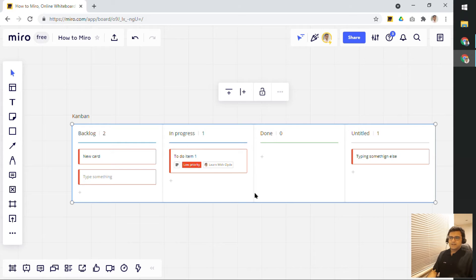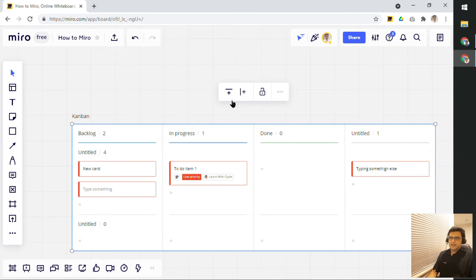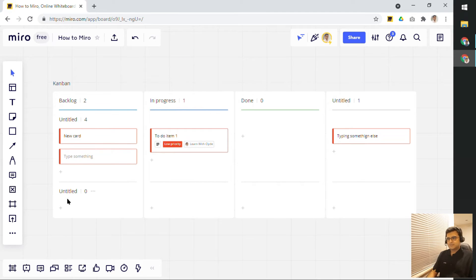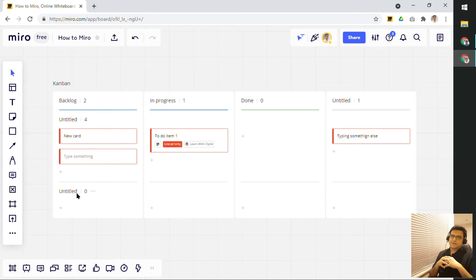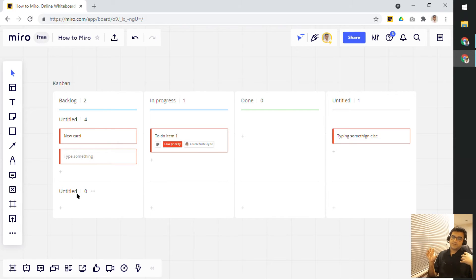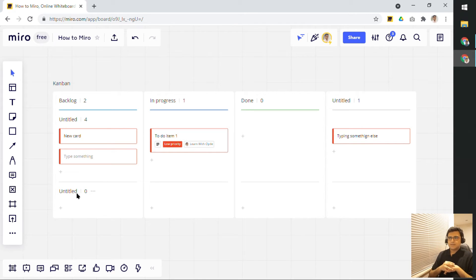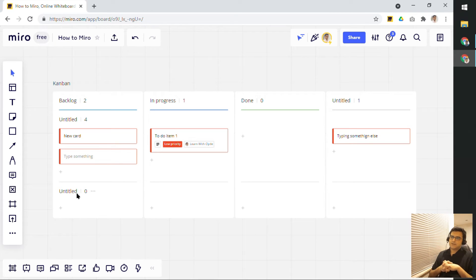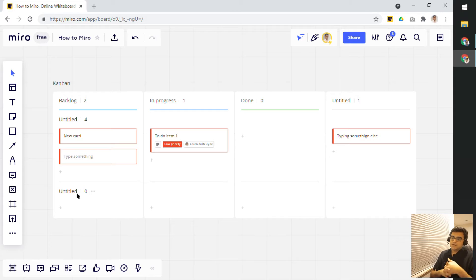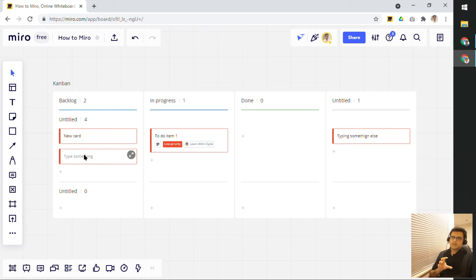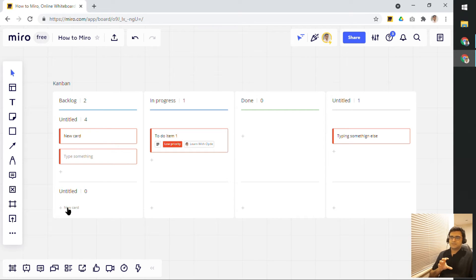Now, if I click on the board, I can click and add a new swim lane. Now, this is useful for example, if you were, let's say, planning something, but you have two different pipelines that you want to look at and two different streams that you want to look at. So, let's say one team is looking at feature one and the other team is looking at feature two. And maybe you want to track, you want to group basically the cards by that feature. So, the first swim lane will be feature one, second swim lane will be feature two.